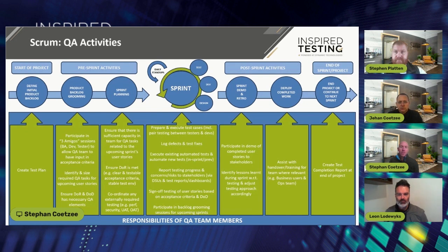Was it release management, where faulty versions were deployed to your test environment and you had to retest? Was it unclear requirements or acceptance criteria, whatever the case may be? Then work at those weak spots and try and improve sprint by sprint. I don't think you'll ever get to a no-defect sprint, but there are definitely areas that you can work on as the sprints tick along.